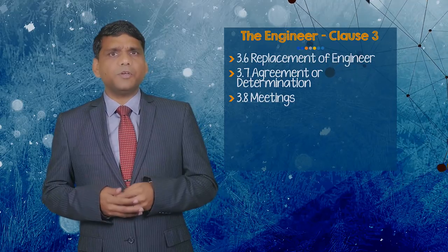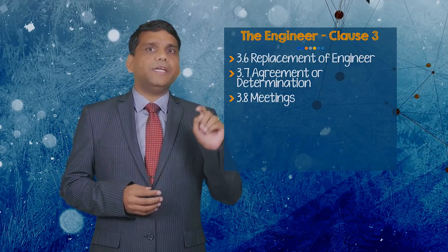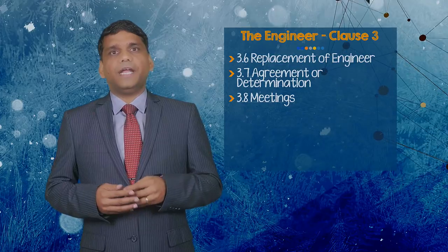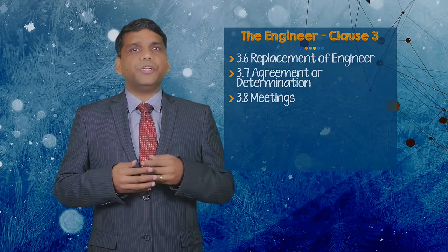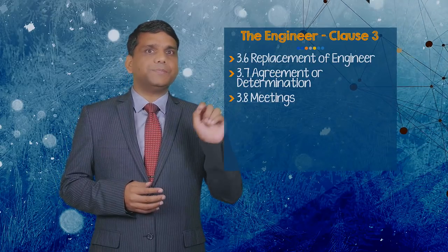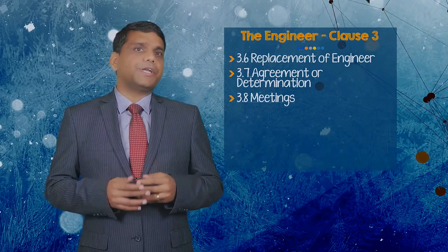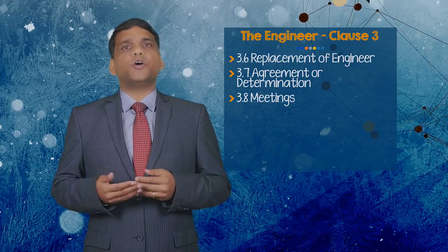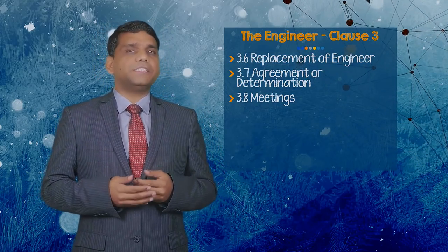The role of the engineer is now more prescriptive and procedural in nature, and the engineer is expected to act neutrally when exercising authority under sub-clause 3.7. Sub-clause 3.7 is lengthy, spread over 3 pages, and needs time for understanding. As per new sub-clause 3.8, Meetings, the engineer is obliged to keep records of meetings and supply copies of minutes of meetings to the participants.